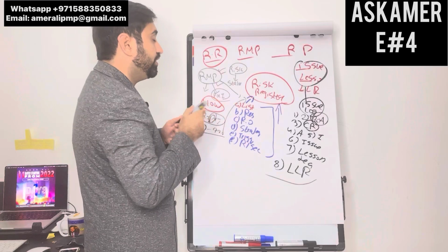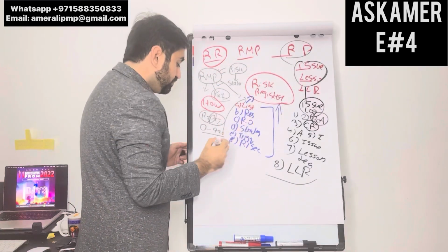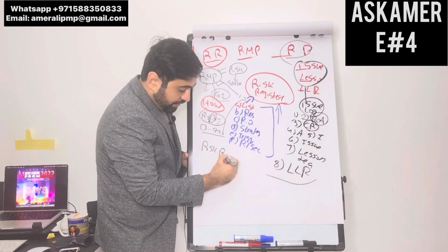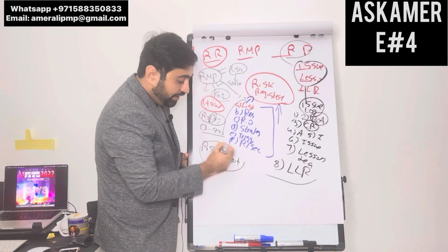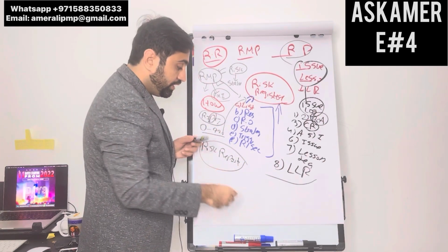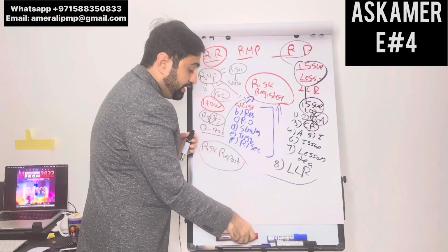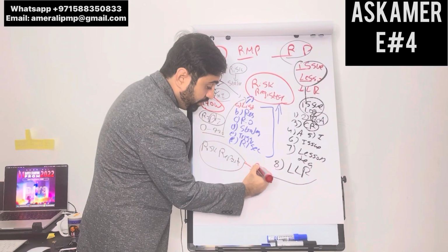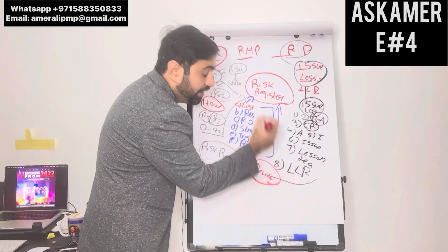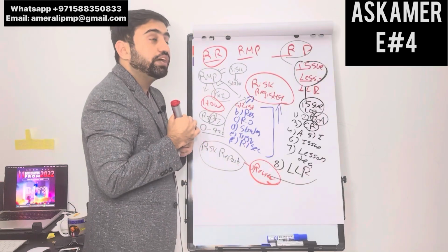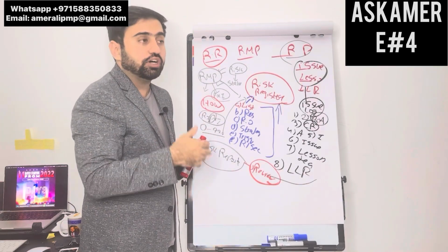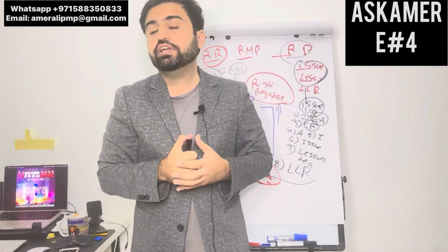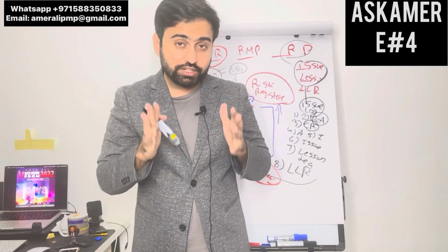Now the last thing left: the risk report. A risk report is a weekly or monthly report that is generated for the risk review meeting. In the risk review meeting, you look at what risks have occurred in the past in the project, how much reserve we have utilized, and how much more reserve is needed. Those forecasts for weekly or bi-weekly meetings we put into the risk report.